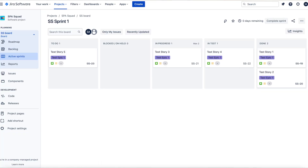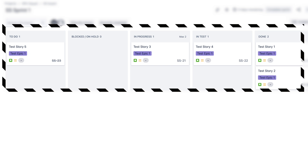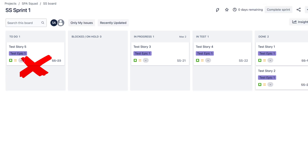But how do you get this data? Well in my last video on aging work in progress charts — link on screen now — you might remember that I said it was really important, once you've actually started a story, to put it into your blocked on hold workflow state whenever you're not actually working on it. And this is how you will get your active time data. So in this example from Jira, you can see the workflow states: to do, blocked on hold, in progress, in test, and done. We're going to exclude to do because when a story is in to do, we're not actually working on it — it's basically queued, ready to pick up when we have capacity.